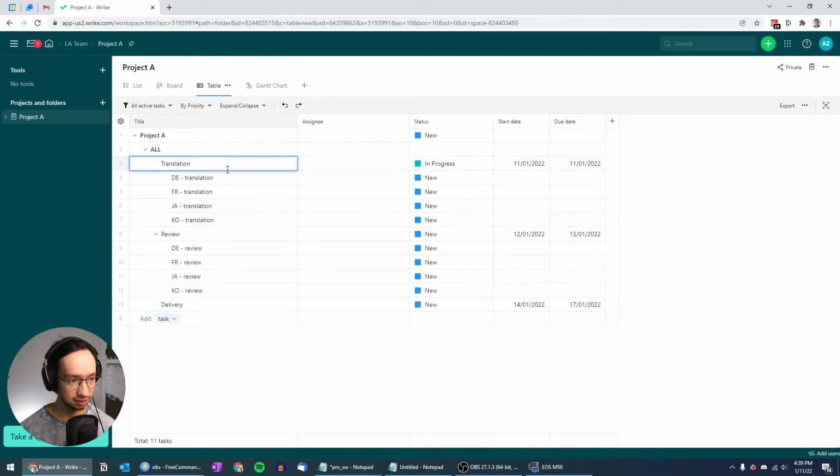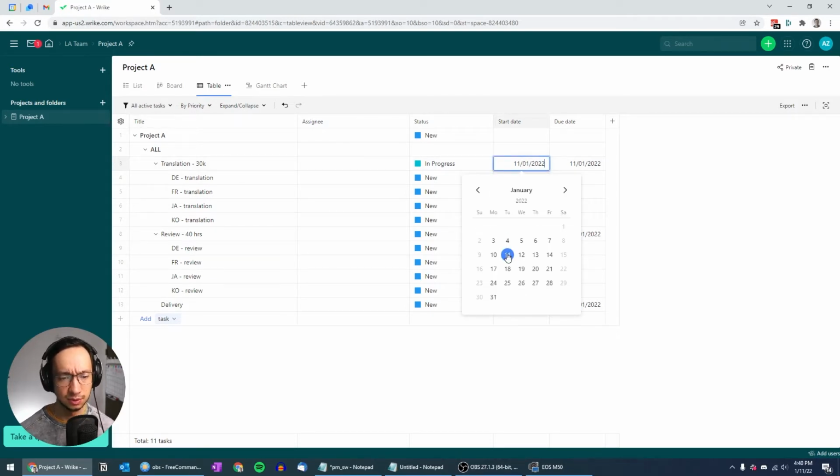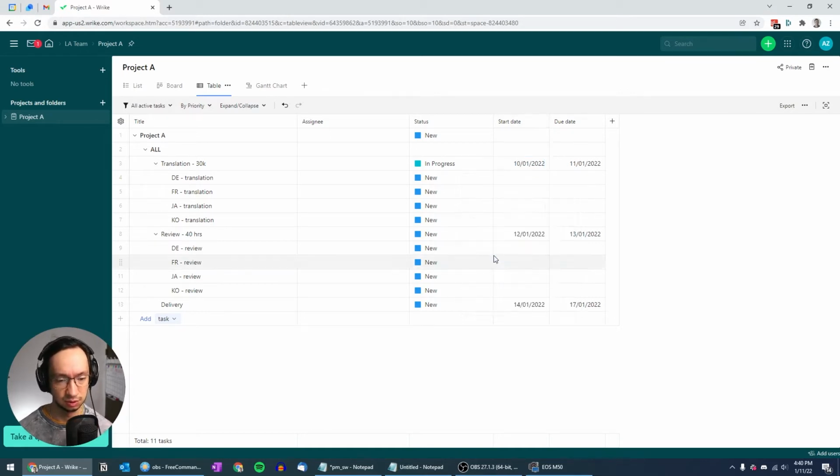One more thing that I forgot to add is the scope. So for translation, we do 30K. For review, I think we have 40 hours, and then we just deliver. So now that I have the effort, I'm going to set the dates. Today is Tuesday when I'm recording this, January 11th. I'm going to say that we started translation yesterday. And for 30,000, that's going to take 3 weeks, so end of January. And I'm going to copy the dates into the subtasks. And this works pretty fine.